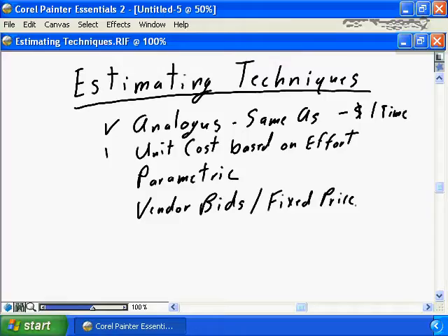You may be able to develop your estimates based on a unit cost based on effort, i.e. you have already gone through your detailed time analysis. You've already allocated specific work estimates to each and every unit of the work breakdown structure. Maybe your cost estimation is as simple as determining the unit cost. Remember the direct cost and the appropriate indirect cost allocation for each and every team assignment times the effort assigned in the work breakdown structure to come up with the cost for the task.